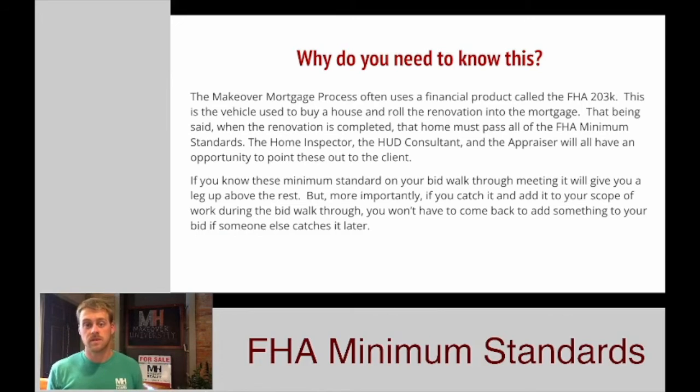So you need to know them because when you put your bid together, anything that wouldn't pass an FHA minimum standard will need to be included as part of your bid. The good news is the realtor who walks through the home, the inspector who checks out the house to make sure that it's safe, secure, and sound, and the HUD consultant that walks the project with the client are all going to have 3 good sets of eyes on the project, and one of those 3 or 2 of those 3 or a combination of them are going to let you know for the most part what all those minimum FHA standards are and where the red flags are.